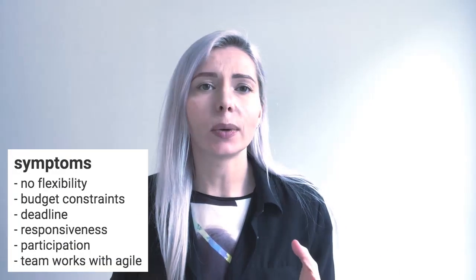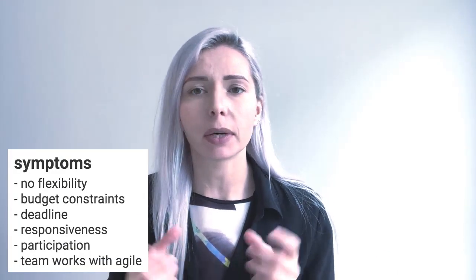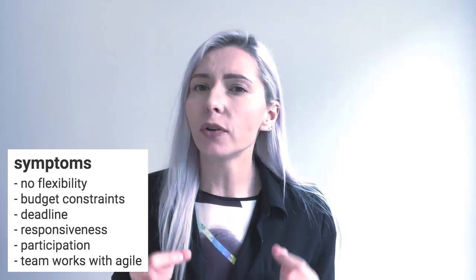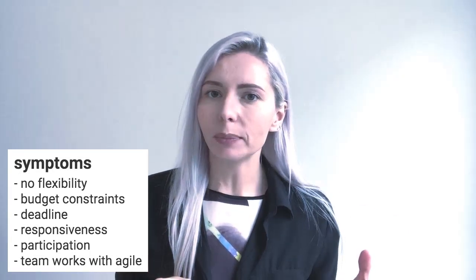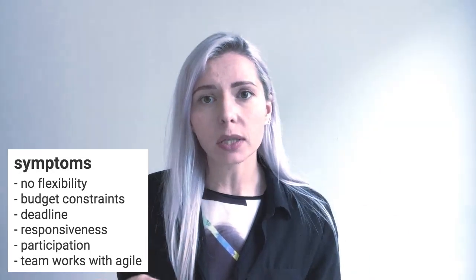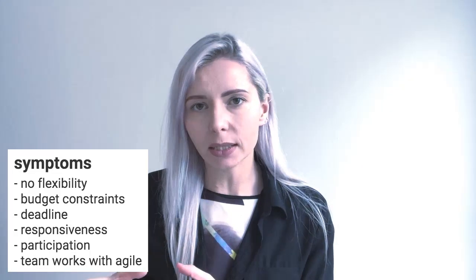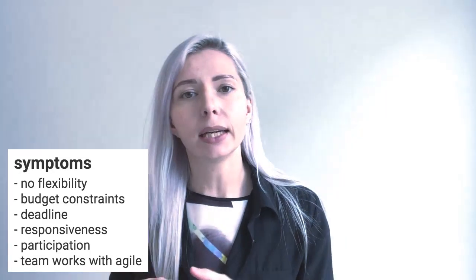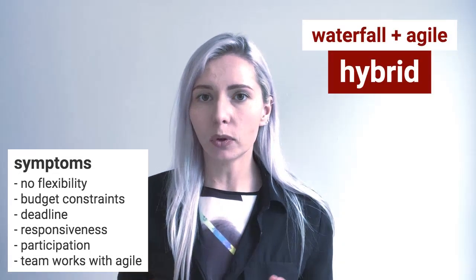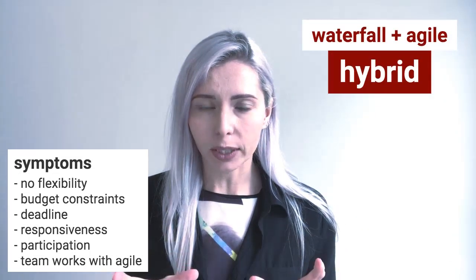Regarding the situation when the hybrid of agile and waterfall would be the most appropriate solution, it is when, for instance, the client is not very flexible about the budget, or he wants to know the key criteria in advance, so how much it would cost and when the project will be delivered, but at the same time he's very responsive, he wants to participate, he wants intermediate demonstrations, and he wants the project to be deployed iteratively, or maybe the team is extremely comfortable with the agile development approach. We are picking hybrid here.